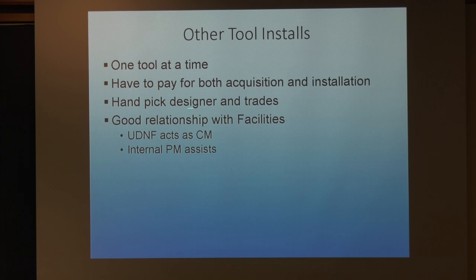We always handpick the design and the trades. As long as we stay under a limit, I think like 50K or 100K, we can just pick whoever we want. We don't have to go for competitive bidding. I have a great relationship with facilities. We, the UDNF staff, act as a construction manager, and the internal PM assists us with bids and things that I don't have access to in the university system.